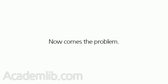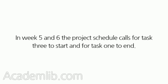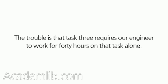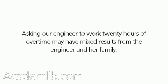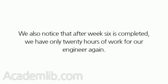Now comes the problem. In Weeks 5 and 6 the project schedule calls for Task 3 to start and for Task 1 to end. The trouble is that Task 3 requires our engineer to work for 40 hours on that task alone. If we try to complete the work on Task 2 and start working on Task 3, we will require 60 hours per week of the engineer's time. Asking our engineer to work 20 hours of overtime may have mixed results. We also notice that after Week 6 is completed, we have only 20 hours of work for our engineer again.